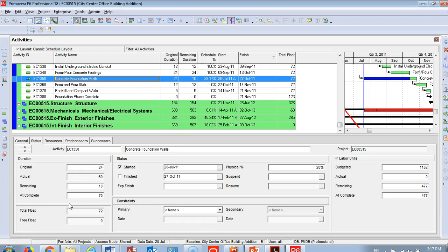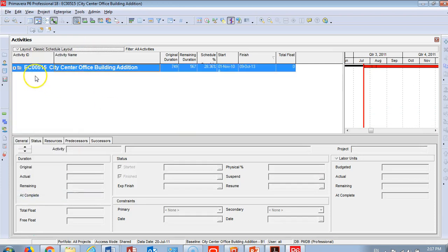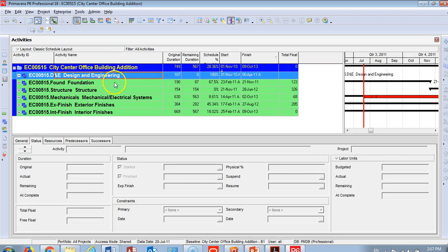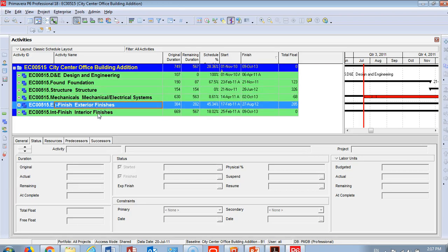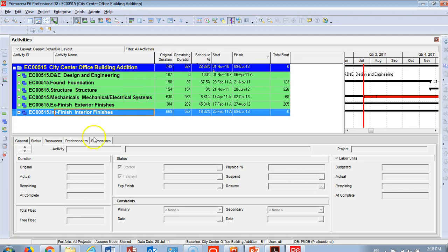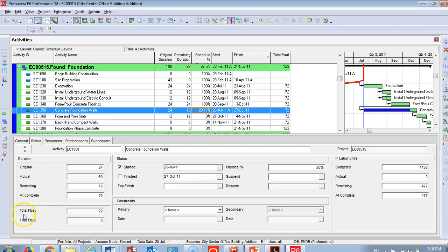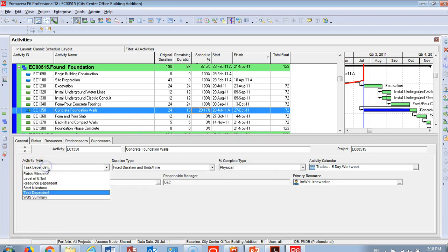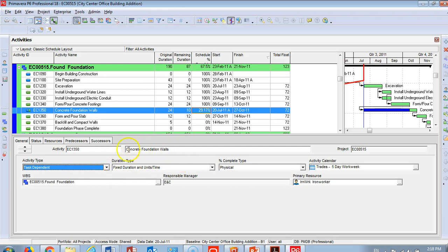Now we're in the live Primavera P6 version 18 software. I'll go to the layout and collapse everything — this is the office building project we discussed before. Here is the WBS: design, engineering, foundation, structure, mechanical, exterior, and interior. Before updating any activity, go to the General tab and understand your activity — the activity type (task dependent, level of effort, or start milestone) and the duration type.